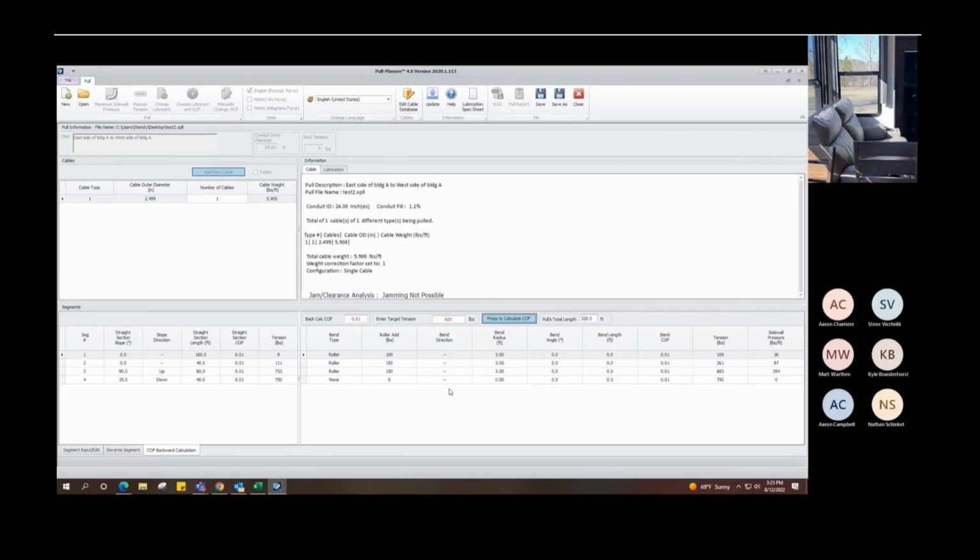Well, when your friction is really high like that, you can't pull your cable as far as you would like to. So you want to keep your coefficient of friction number low, and you want to keep the tension low on your cables. Because this contractor kept all of their field data, and they were averaging a 0.17 and a 0.18 in the field, they were able to convince the owner of the project to let them use 0.17, 0.18 in their calculations so that they could design to pull their cables further and have less splicing, less manholes, less vaults.